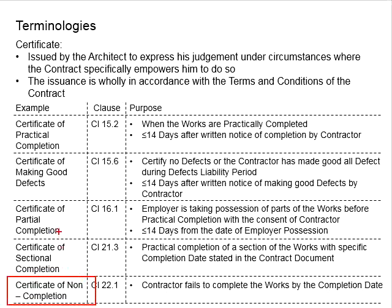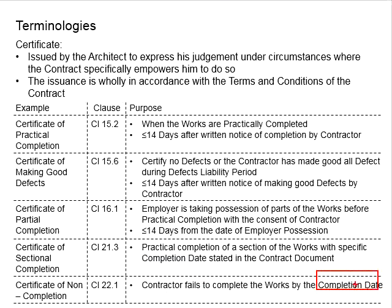Next is the certificate of non-completion, found in Clause 22.1. It is issued when the contractor fails to complete the work by the completion date. In the contract, the completion dates are specified, and the contractor needs to complete and hand over the work to the employer by that date. Exceeding the completion date means the contractor fails to fulfill his obligations in delivering the work within the stipulated time. As a result, the certificate of non-completion will be issued. Normally, the contractor does not like this to happen as this can incur a penalty, which is also stated within the contract document.